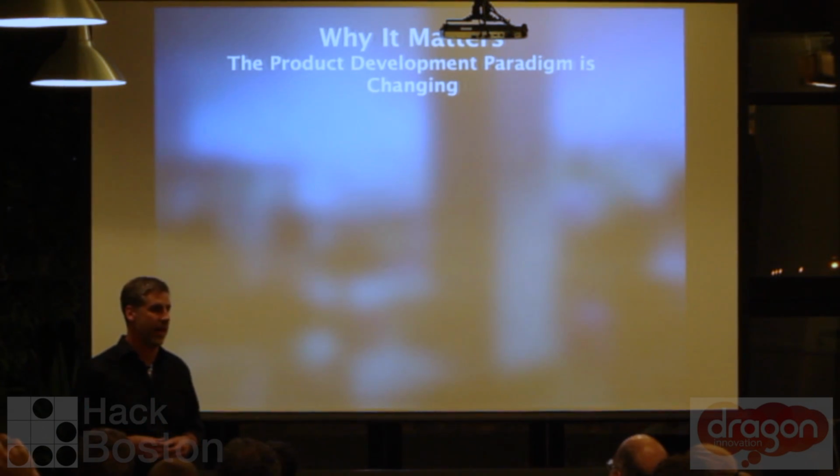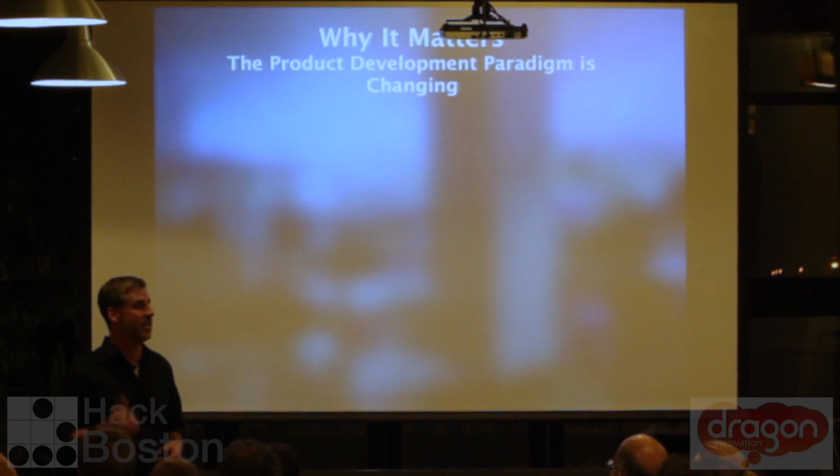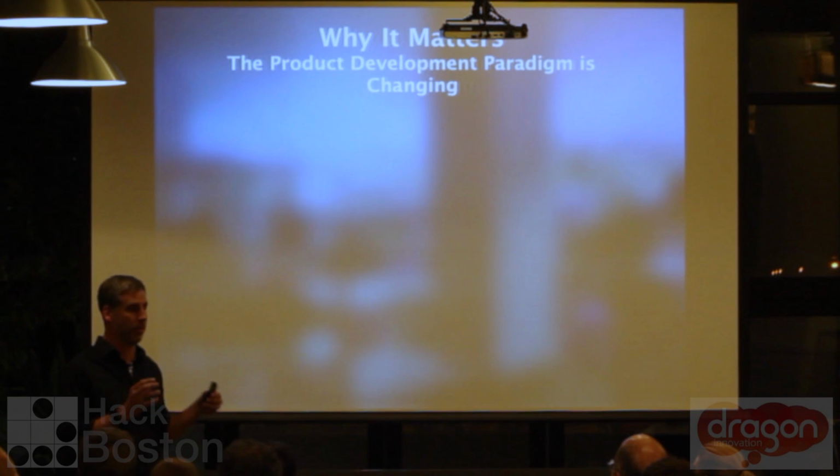So you can do that, and what drives the cost there is just the price of the material, and then the labor rate and the overhead of the machine. So how long does it take to go? How much does the operator cost? How much does the electricity cost and the maintenance? So it's all things that you can definitely figure out. And we have different formulas for extrusion, milling, and so on. But we would take the same approach to injection molding.